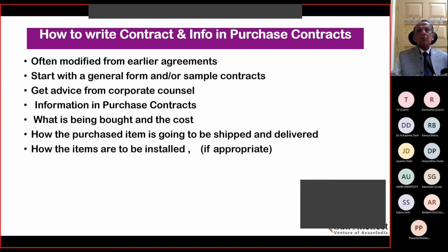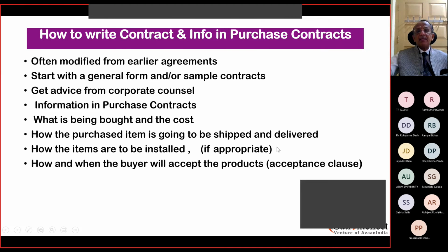So such things you should incorporate in your contract charter. That means when you say delivery to foundation, you state in brackets, delivery to foundation on the base level only. Hope you recognize the importance of being so specific. Please understand, when you deal with contracts, one has to be very, very specific.